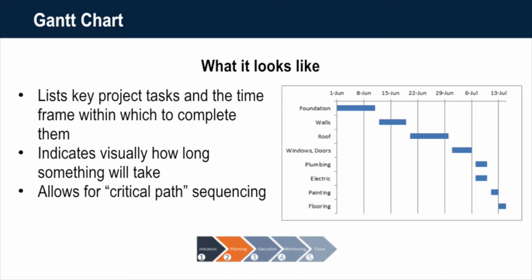And so what this looks like is usually set up as something of a critical path type of diagram. And so those same things that you just shared that are in your top line, so planning, implementation, logistics, recruitment, and so forth, those things then populate the map or your Gantt chart that you use along the way, so in that vertical column. And then next to that, logistics might in fact require the entirety of the project to work on, whereas recruiting might just be a short window. And what you can then create are what are the things that must happen before we can begin the next item in the list.